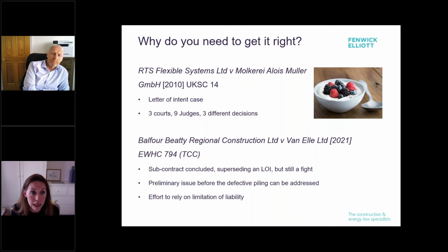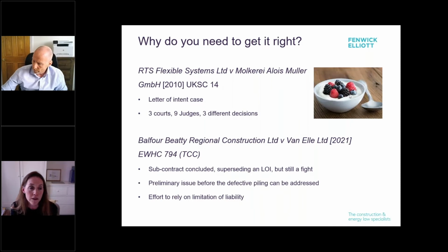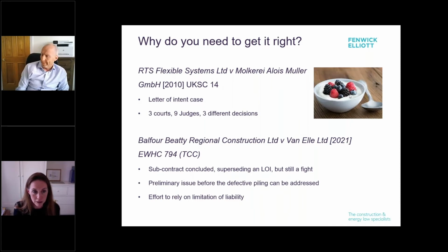So here, Van L had carried out some piling works to support a large structure known as the North Carousel for Balfour Beatty. The piling has had to be replaced and the North Carousel taken down and then eventually put back together again. There was a subcontract on this one, but Van L tried to say it did not apply to the North Carousel, and instead they argued that their terms and conditions, which contained a nice little limited liability clause and that had been attached to their quotation way back at the beginning of things, applied to that instead.